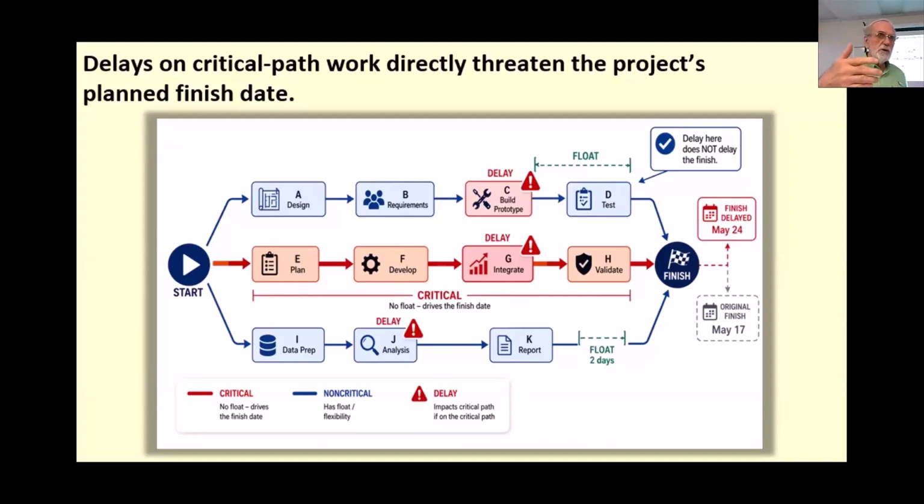So once we're in execution, in planning the critical path is kind of static. That's our baseline critical path. Once we start executing, we need to really analyze the impact on our schedule. Most of the tools that I've worked with allow you to do a critical path analysis, and it'll go through the schedule and tell you if it's changed or not. So as part of your job as a project manager, it's important to keep that critical path awareness.